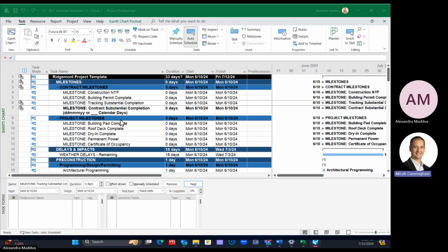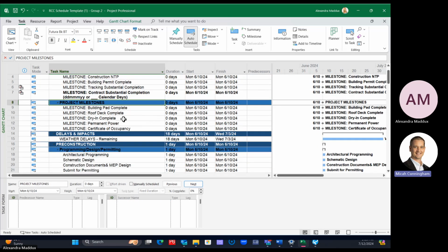Okay. So to start off, we have our milestones at the top. Because we went over changing the durations to 0 last time, right? Everyone good there? Okay. So that is how we made it a milestone, just a recap. We made it 0 days. That gave us the diamond, made it a milestone. And then if you want to make something a summary task, did we do the indent to make it a summary task? Okay, cool. Perfect.